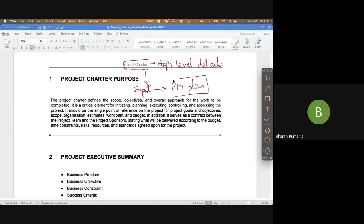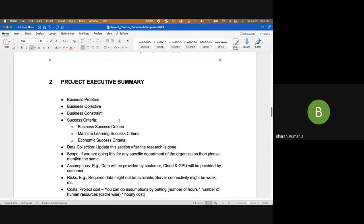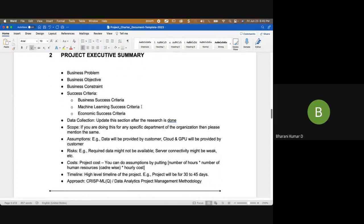This document will go as input to project management, which is a more detailed or low-level document. You'll have the high-level scope of the project, high-level timelines, high-level budget, high-level risks, and key stakeholders. As part of your project executive summary you should mention your business problem, objective, constraints, and success criteria.